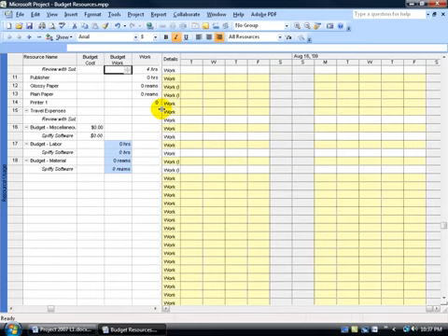Now see if this makes sense. Again, we've got our zeros here. The only zeros that we have, or these fields that allow us to enter anything in for the budget cost field, is for the budget cost resource. For the budget work, we've got hours for the budget labor or the budget work, and then also reams for the budget material. Now why reams?